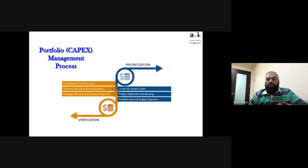The things we talked about in the last webinar, out of a portfolio day or prioritized portfolio, you will have things which are approved as is, things which might be accelerated, which means it's such a good project, or it links strategically so well that we want to accelerate the execution of it, so you put more resources to it than what was originally planned. It might be decelerated: it's still a good project, but maybe the strategic alignment is not there right now, and it needs to be delayed a bit. So you may decelerate the execution. And then there are things which are deferred because they just didn't make the cut. They still might be needed later on, so you don't cancel them outright. And finally, there might be things which are canceled. Why I'm going through that right now is because in the next stage, it becomes important. So let's look at the next stage.